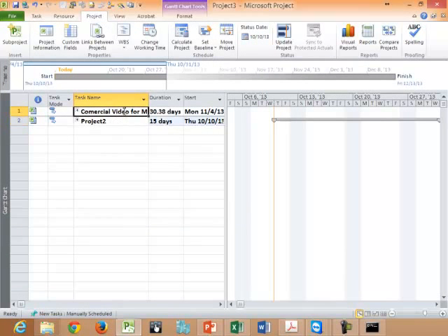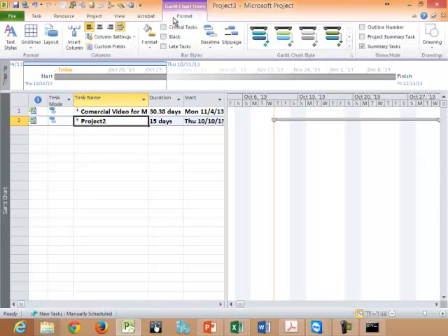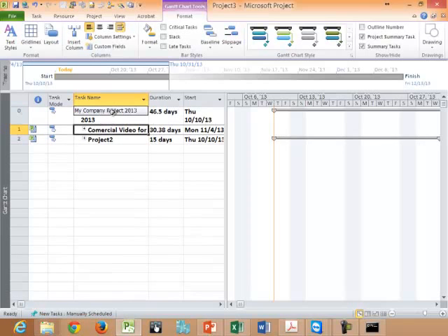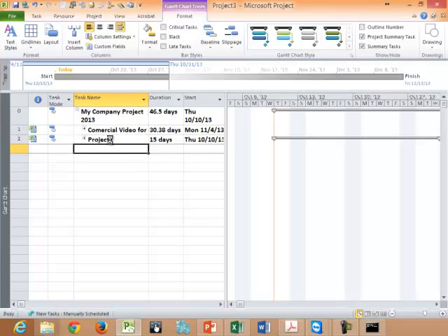So now you have video commercial and project 2 comes in. Okay, you want to see the whole project, then you can again add another sub task. So this sub task you can add in, okay, my company project 2013. Okay, everything is there. So the total project for me to do project video and project this one, you will have a time span of 46.5 days. Okay, so when you finish, again you can add another milestone here, another milestone.